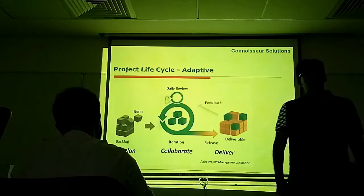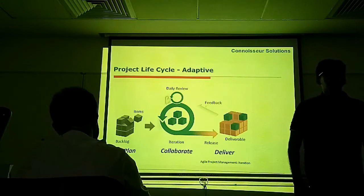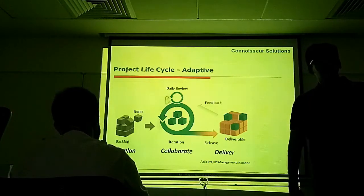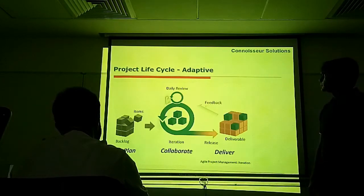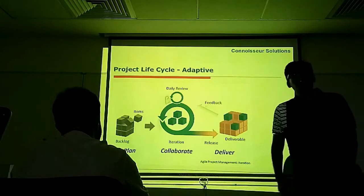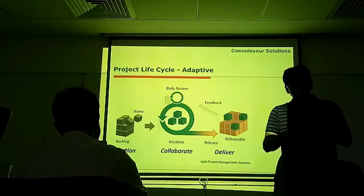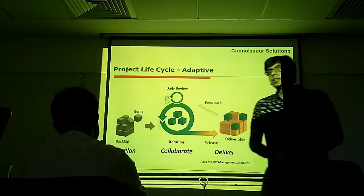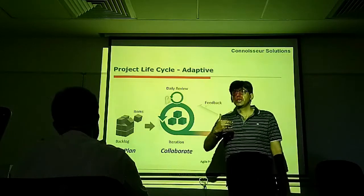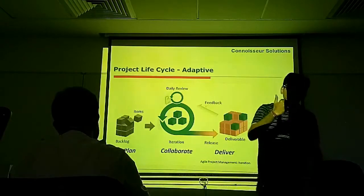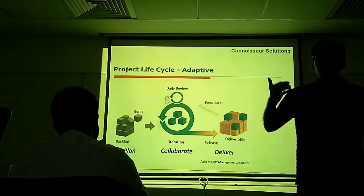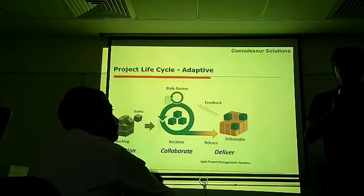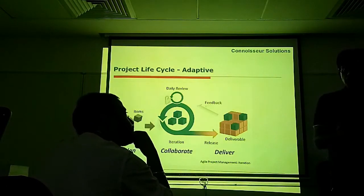That's why we have to follow this model. What is this backlog box? Let's talk about this. Generally, the way we manage scope in an adaptive or agile project is through product backlog and through sprint backlogs. Product backlog consists of overall scope of the project.